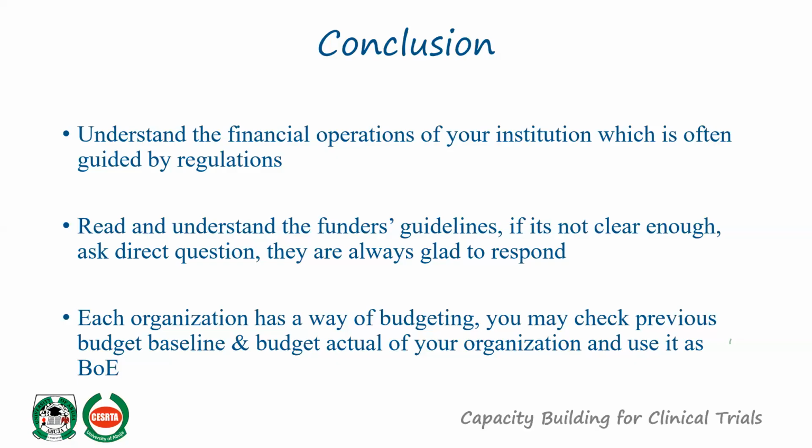He will have used another estimate to get the salary of the principal investigator, which will not be the right one. Whereas it might be right in other institutions, because he might be looking at other institutions and not the College of Medicine. So it's always better we look at the previous one that has been done, then we benchmark with the current reality, and we will be able to do a good budget with that.